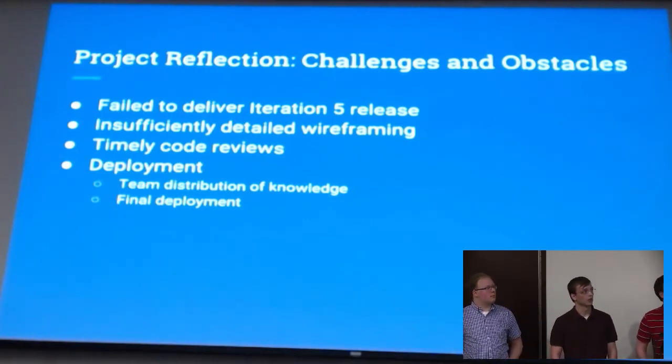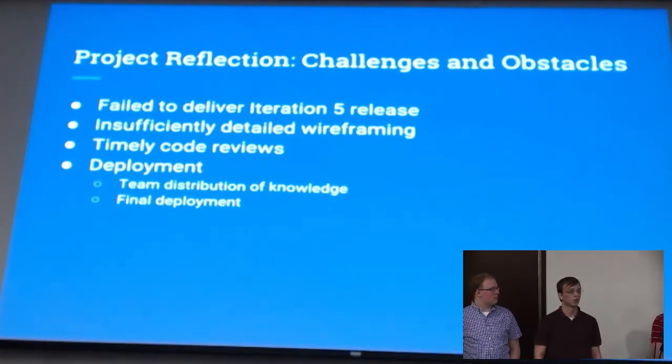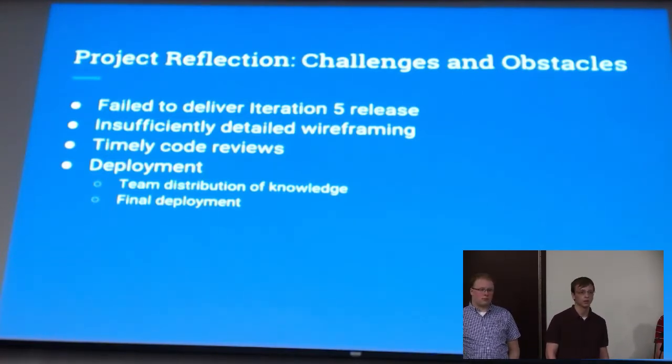Sometimes we didn't manage to merge our pull requests in time. This is because we had a self-imposed restriction of at least 2 approvals in order to actually merge a pull request. So this occasionally caused some PRs just to kind of hang out until people got around to it.